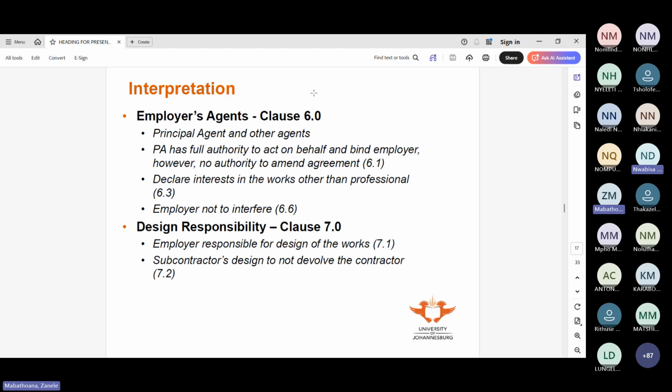So if your specification says 20 millimeter thick Meranti skirting, and your bill of quantities speaks of clear pine skirting, you look at the quantity in the bill of quantities, but the specification is what is given by the architect. The priced document is mainly for your quantities, not for specification.